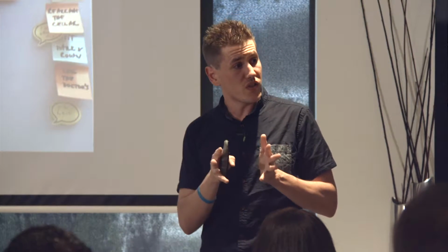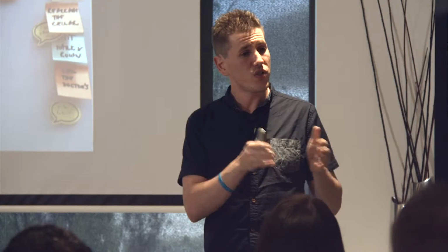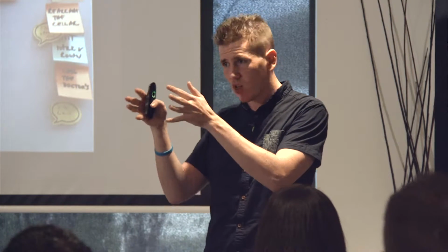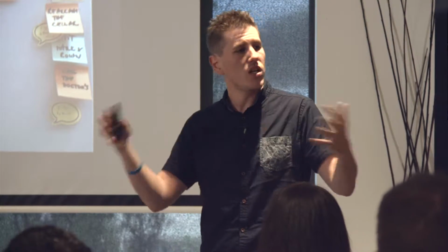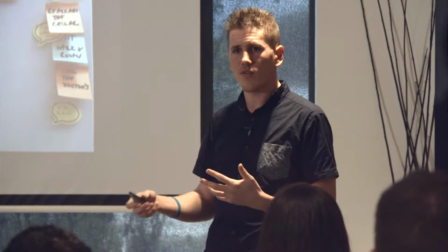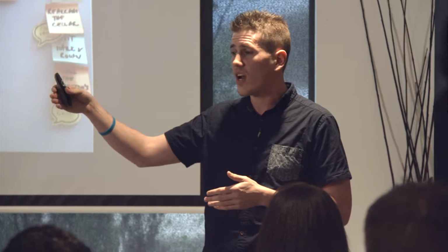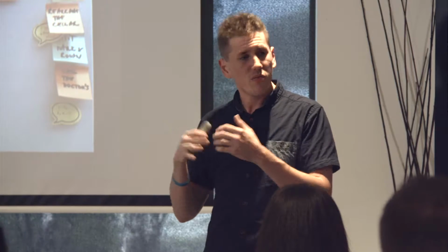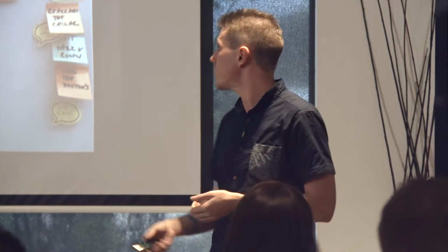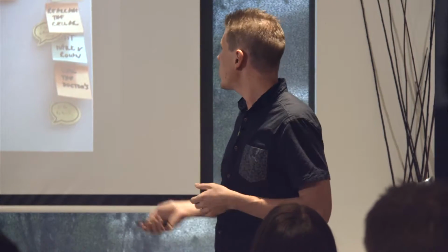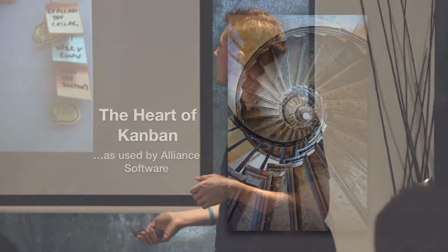By making sure that things never move backwards, you're actually focusing your attention on what was the closest thing to completion in your whole process. There is no concept of going backwards. If there's a thing that's stranded upstream, you need to swarm that, fix the problems that are there, and get it released. And as I mentioned, the most simplistic representation is to do, doing, and done.